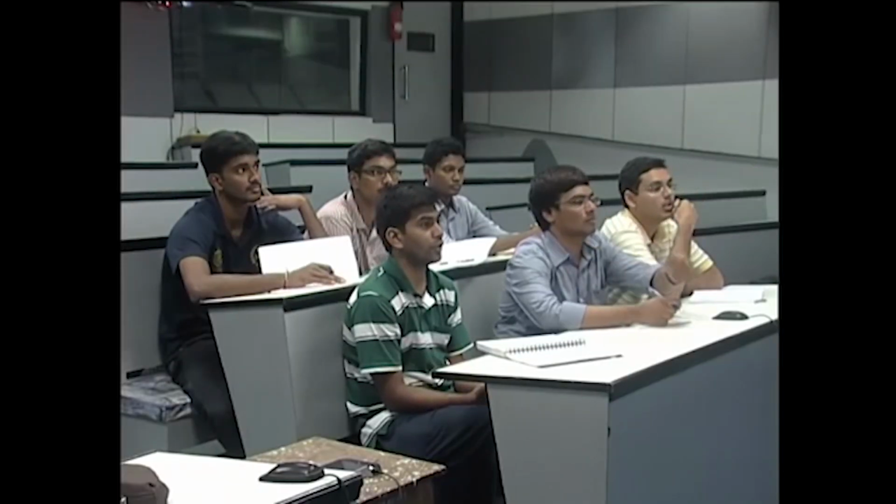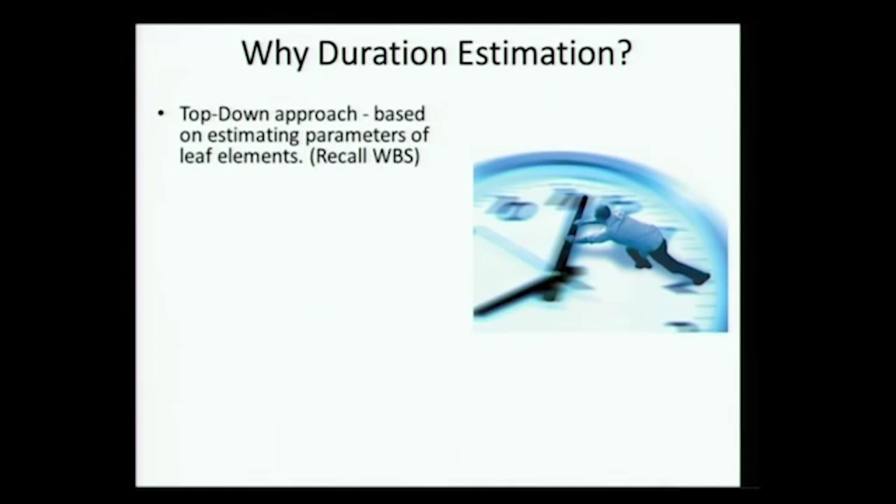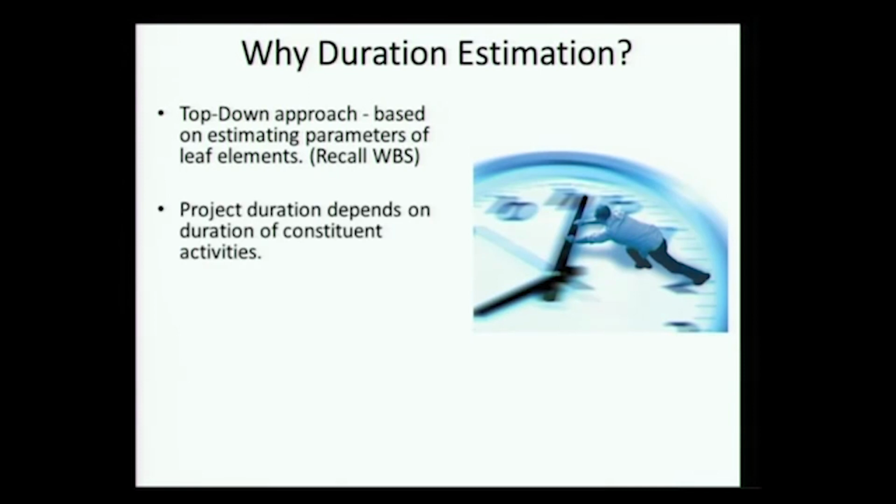To calculate the whole duration of the project. Yes, so we actually come on a top down approach. You remember the work breakdown structure has leaves, at those leaves are there activities, and only if we calculate duration of these activities can we calculate project duration. That is the approach we are taking.